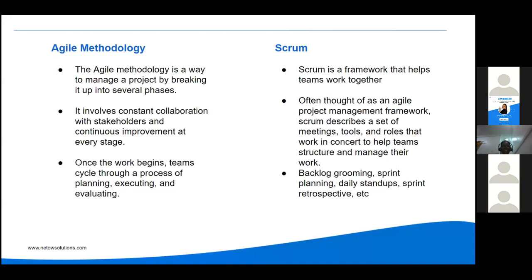In Scrum you have daily stand-ups, sprint planning, backlog grooming, and sprint retrospectives. Backlog grooming is where you've already identified everything you need to build and broken it into epics, stories, and tasks. An epic is a large chunk of what you want to do. A story is the breakdown of that work into actionable components and milestones. A task is the minimum amount of work that needs to be completed for the story to start.